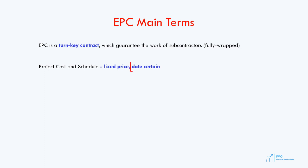The EPC contract is date certain, so the project must be built and ready for operation by a certain date. This is advantageous for the sponsor, especially when the sponsor incurs penalties for construction delays, which is typical in project finance transactions. For example, in power projects, the power off-taker will penalize the sponsor if the project is not ready to generate power by the date indicated in the power off-take agreement. Additionally, when the project borrows money from the lender, interest must be paid, so a project delay means more interest costs. Therefore, the construction contract must be date certain in project finance transactions.